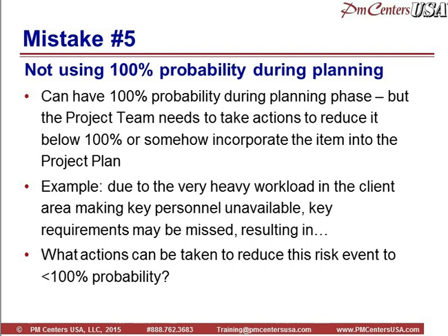Now, what we did, we gave it the biggest impact of all, a 10, because, again, if you don't have complete requirements, you will have a schedule problem, a cost problem, a functionality problem, a quality problem. It impacts everything. So that was a showstopper, and it got the attention of senior management. And their answer was, we can't not do this project. We have to do it. You need to figure out a way to get requirements. And my response was, well, you need to work with me on this. Then we need to put a plan in place that's going to make these people available and make it a priority for them to deal with us to give us requirements.